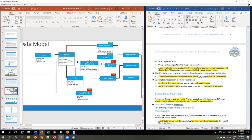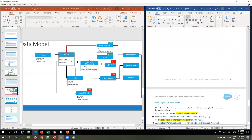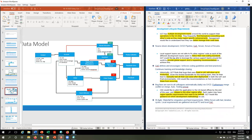Could we go to the governance requirements? I would like to discuss rolling out the first version of the system to the US. You mentioned a hybrid approach using waterfall only for integration and fixed requirements, and Scrum for the rest. How are we going to ensure the system is flexible enough to cover local customizations for other regions? The architecture team has to anticipate, together with the global COE and stakeholders, what might be similar and what might be different per region. So we can start to define early on which parts have to be modularized and which parts can be fixed across all regions. This is part of the homework which the company has to do before we start the project.